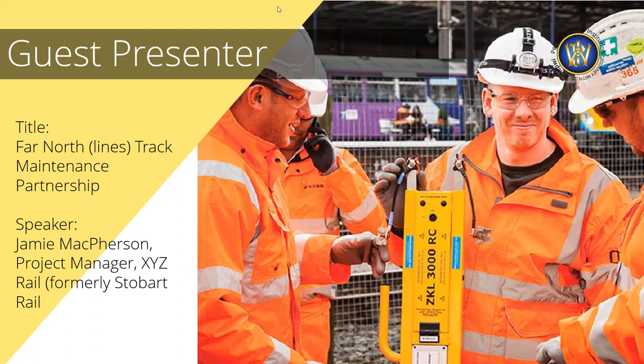The network management, one of them was an ex-section manager. He was very, very keen to see what was required to be renewed rather than just what was in the spec. You know what I mean? So sometimes we move a little bit, as long as obviously the job was right. There's one site we actually reduced by 50% because that rail was still good to use. So instead of just doing what it said, we actually thought about it, made inquiries, TQs, stuff like that. We tried to do the right thing.